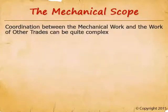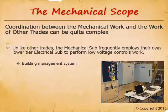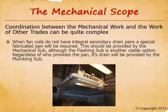The mechanical scope requires the most coordination discussion. Unlike other trades, the mechanical subcontractor frequently employs their own lower-tier electrical subcontractor for low-voltage controls work on larger commercial projects. This can include all conduit and wire for building management systems, low-voltage circuits for variable air volume boxes and fire smoke dampers, and conduit and wire for carbon monoxide monitoring systems in parking garages. When it comes to condensate, we always want primary and secondary containment.